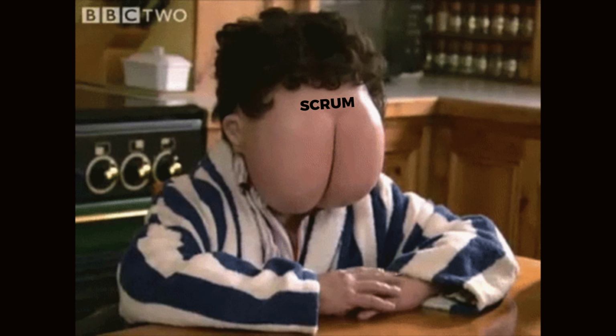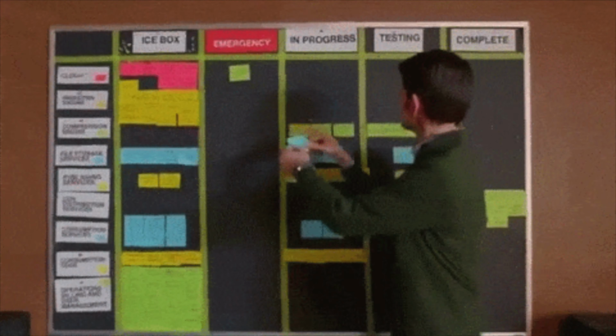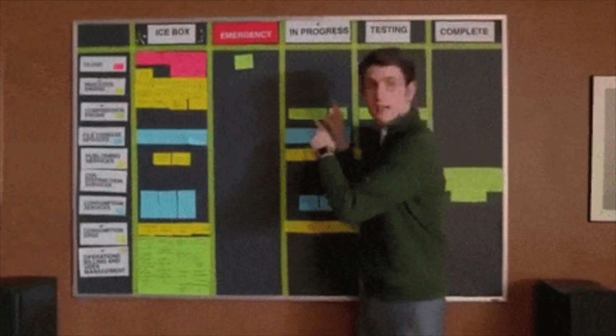Now, I've seen many Scrum teams not using a sprint goal and getting into a real mess, in danger of turning it into ScrumBut. Why? Because they almost always end up focusing on getting all the stories they take into sprint done, which is the wrong thing to focus on. This is a massive dysfunction and is a slippery slope. So why is that? Well, let's talk about it.